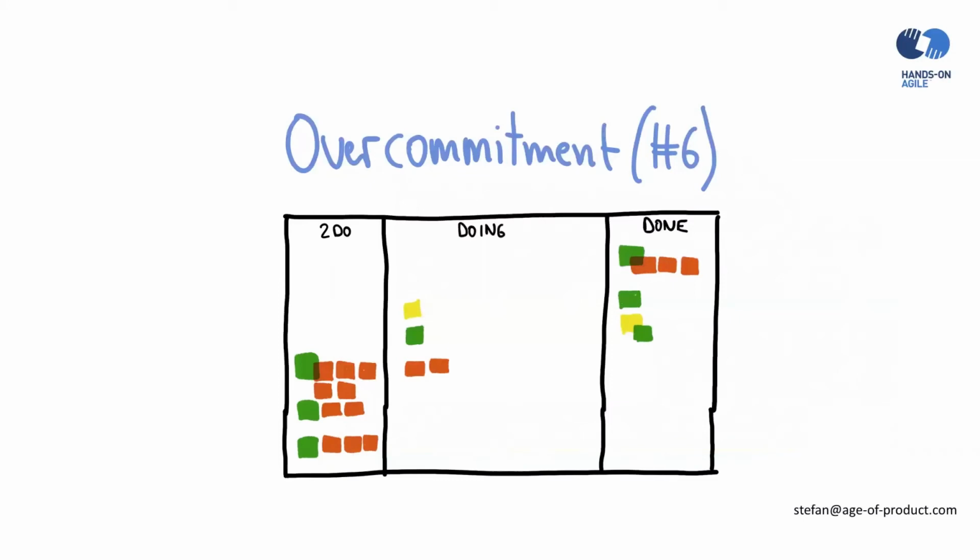The problem with overcommitment is, while reaching out for ambitious goals is a good thing, it actually ruins a lot of the metrics that would allow the team to become better at what it's doing. For example, lead time and cycle time are really affected by overcommitment and resulting spillovers. My tip, take on less, focus on the sprint goal, just pull in new product backlog items the moment you will be running out of work after accomplishing the sprint goal. Anything else, any kind of upfront commitment, forecast, whatever, that you will not be able to deliver is an anti-pattern.